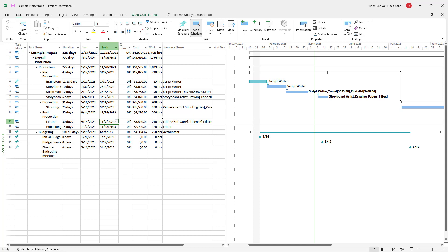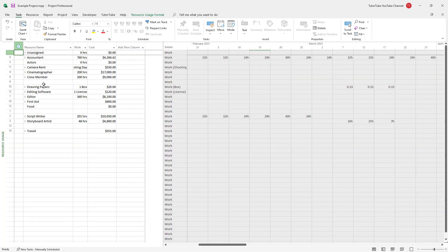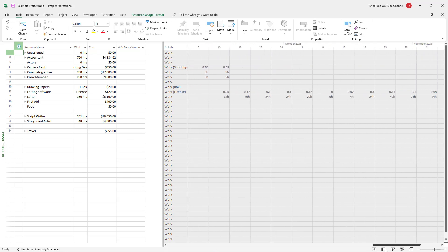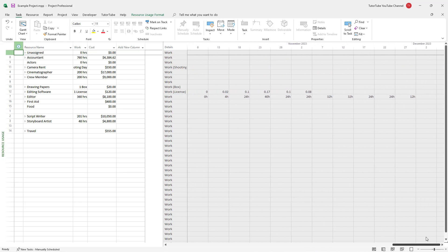If you want to know the over-allocated resources, you can click on the Gantt chart button right here under the task. Then you can go to the Resource Uses section. Once you go there, you get the resource uses and can scroll to see the different resource allocations.